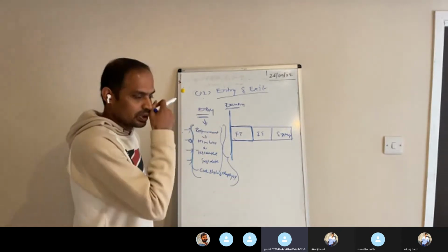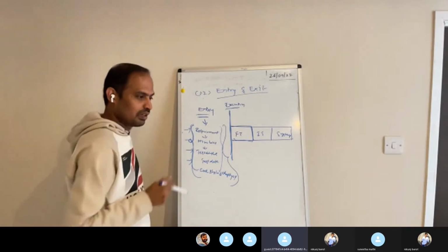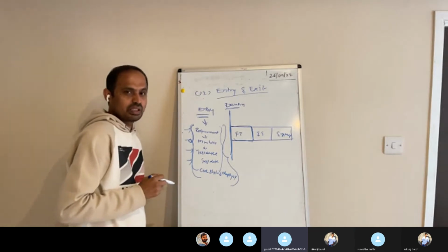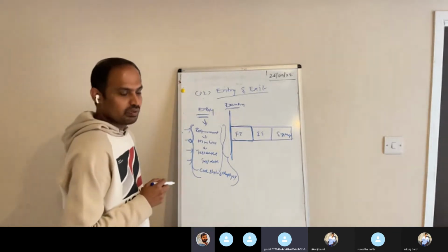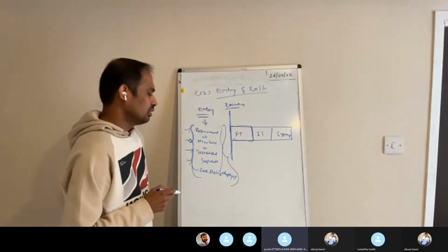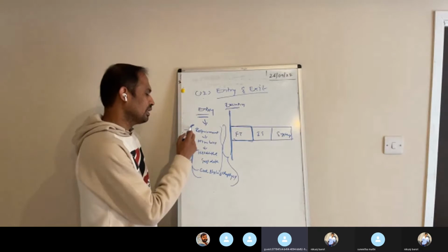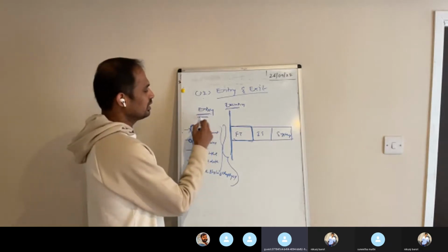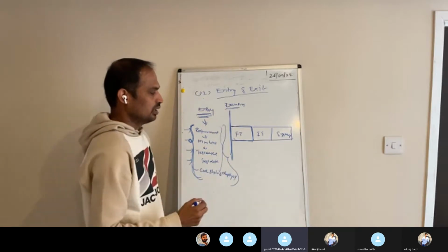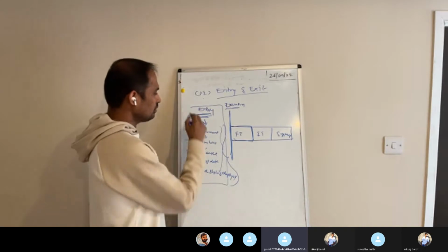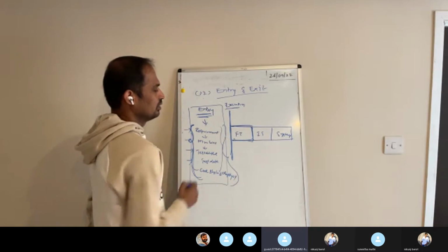So what is the entry criteria to start our testing? We need to have the requirement. We should have completed high level scenarios. We should have completed our test cases, and the test cases should be reviewed and approved. If we require any test data, we need to prepare it, and the code should be deployed by the developers into the testing environment. If all these are met, then this is the entry criteria to start execution. Okay, then we start executing the functional testing.